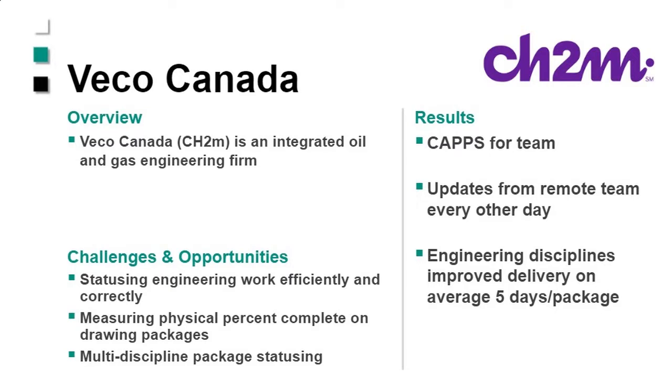So this started to help their delivery on the discipline side to turn around the packages more quickly, because they could see the priorities. That was an important piece. They were not necessarily prioritizing the right scopes because the floats weren't available to them as timely as they needed to be. So that was a big improvement that they saw.